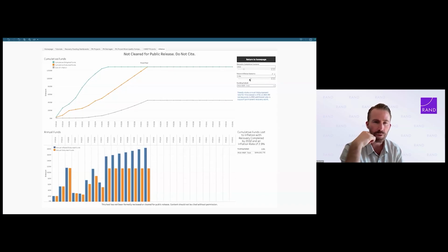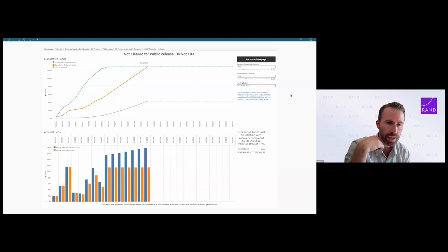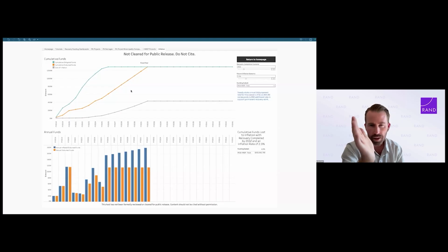So why did I choose 2032? I think that's a reasonable baseline for this recovery. And the reason I say that is I'm looking at the spend rate in the last couple of years, and it's the slope of the orange line. Around 2022, 23, 24. And if we select 2032, it's kind of a comparable slope coming out of the actual data we have versus the projected. So I think 2032 is a reasonable baseline. And in a second, we'll explore what it looks like to go faster than that.